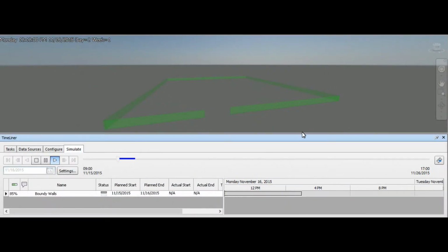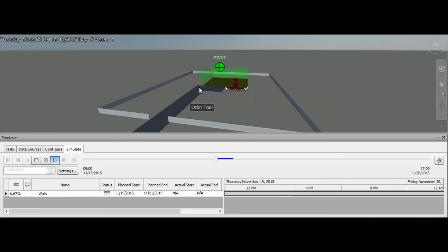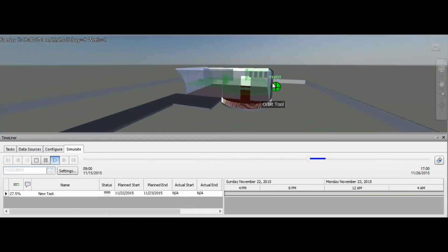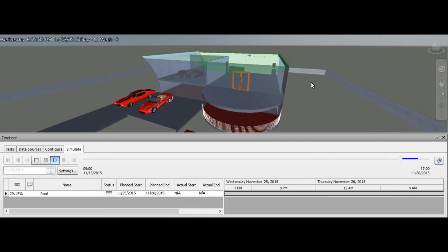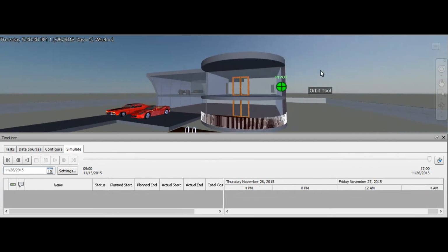So in the previous example, I told you that the planner can attach his particular program to the 3D model, and by doing this and using software such as Navisworks, he can do something called construction sequences, which basically shows how the structure will be built according to his plan from the ground up. All of the activities will be attached to the particular model components and they will be executed as per the activity start date and finish date. So as a result, you can see all of the errors that might occur at the construction phase and already solve them right now. Therefore, you can reduce the risk of construction.